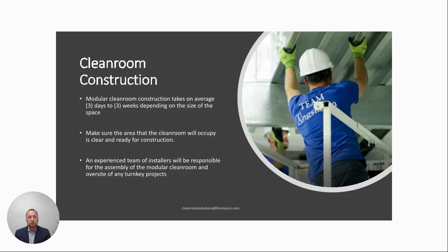Our construction crew is experienced with putting these up. Because all the modular material is manufactured off site, we're essentially assembling when we get on site, compared to stick built construction or stud and drywall, where they're physically building that space and constructing it right there.